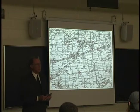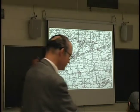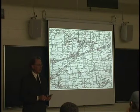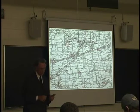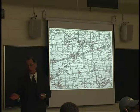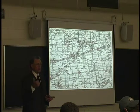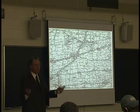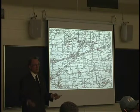Everything we do is primarily hard dollar contracts, very, very little negotiation in our contracts. Bidding is straightforward, whether you're working on a horizontal structure or a vertical structure. You start with your labor costs, you've got your material costs, you've got your equipment costs, and then how much time it is going to take to do it.